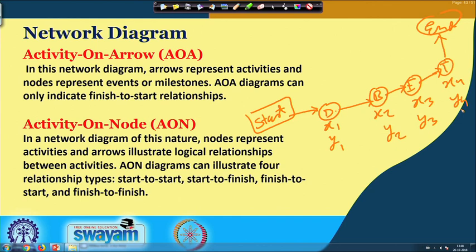The essential assumption is that cost is 0 and time is 0 on the arrow. So, arrows basically connect the activities, but the time and cost expenses on them are 0. So, basically it is the reverse way of presenting the different unit operations in a different type of network formation.